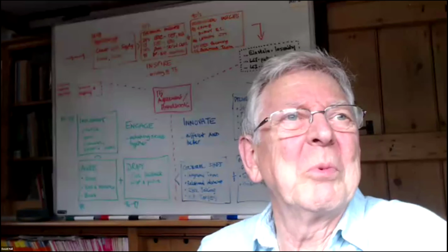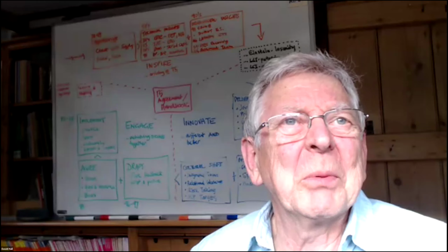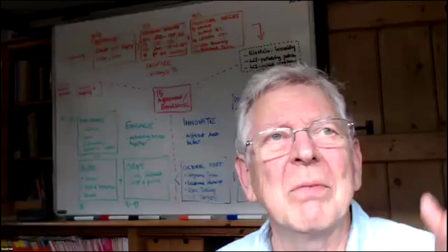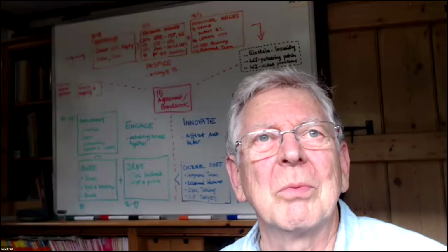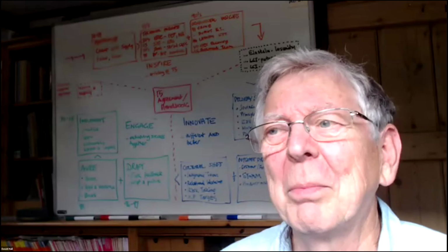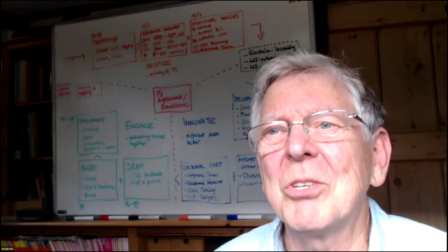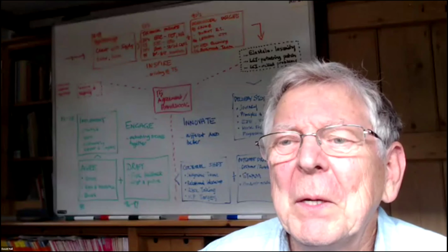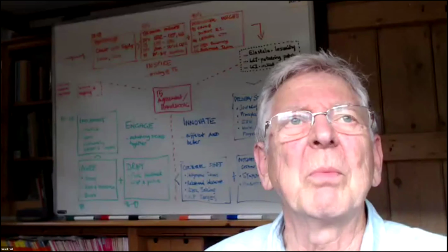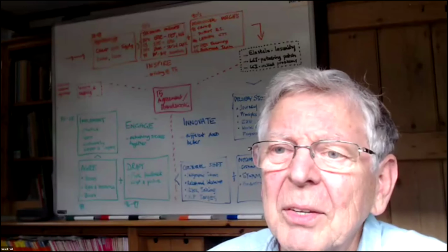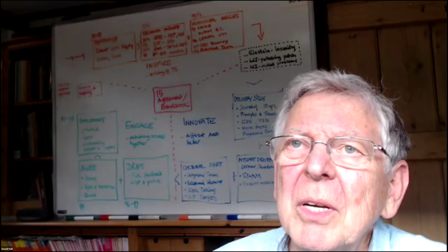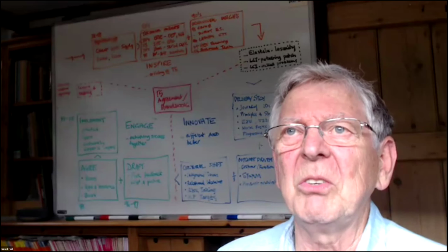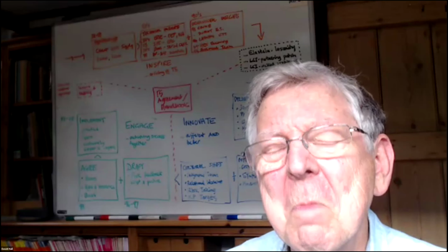My starter on that one, which I think we learnt the hard way, was that whilst we took an end-to-end approach right from very early concept right through to commissioning, we probably didn't pay enough attention to operational integration. And it bit us on the day. We learned that, and when we did T2 and things like that, it was a lot smoother. But certainly that tail end interface of the project process.